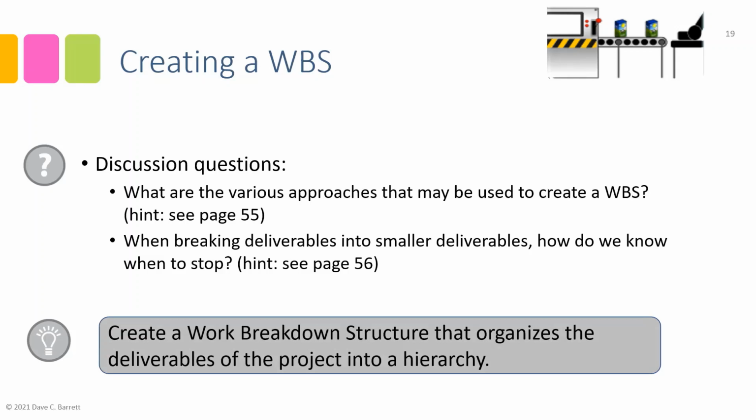So the overall key concept is to create a work breakdown structure that organizes the deliverables of the project into a hierarchy. The WBS is an important document because it organizes the deliverables into a structure. Often it is used when you're creating a budget, which often mirrors the structure of the work breakdown structure. You can also assign responsibility for certain sections of the WBS to different people or teams on your project.